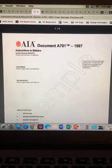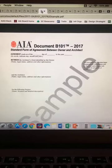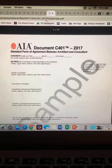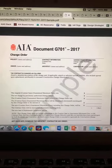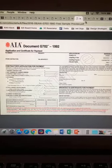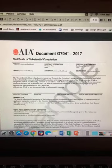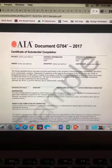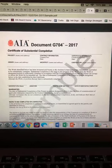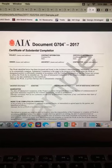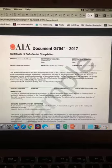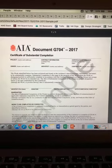Some of the other contracts you have to know are A701, which covers instructions to bidders; B101, the standard agreement between owner and architect; C401, the standard agreement between architect and consultant; and even some from the G series, which deal with change orders, certificates for payment, continuation sheets, and certificates of substantial completion. The architect has authority in determining when a project is substantially complete — knowing what actually makes a building ready to be occupied and when you can tell the owner it's substantially complete is really critical.